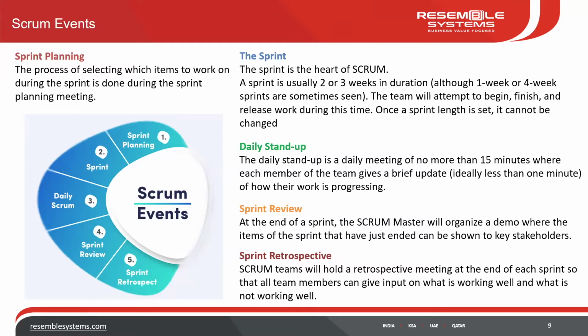So what happens in typical work, if it's not an agile product? Ideally the person who's doing the work will not even open up. It's only when the manager or the team leader or the client says, I was expecting this, why is it not completed? That's when the team leader goes back to the person and asks, you were supposed to complete this, what happened? He will then respond, oh, I had an issue and I've been working on it for the past 4 days. I needed somebody's help and that person is on leave, and that's why I put this task on hold. Why then is the project delayed? We've lost already 4 days. The task that had to be completed 5 days prior is already gone, right?